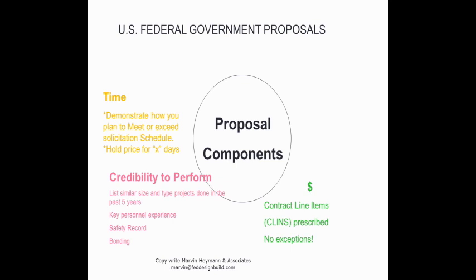If you say my price includes everything but the fencing, for example, in this line item, when the government is clearly needing fencing, they will set your proposal aside. You are in non-responsive mode.